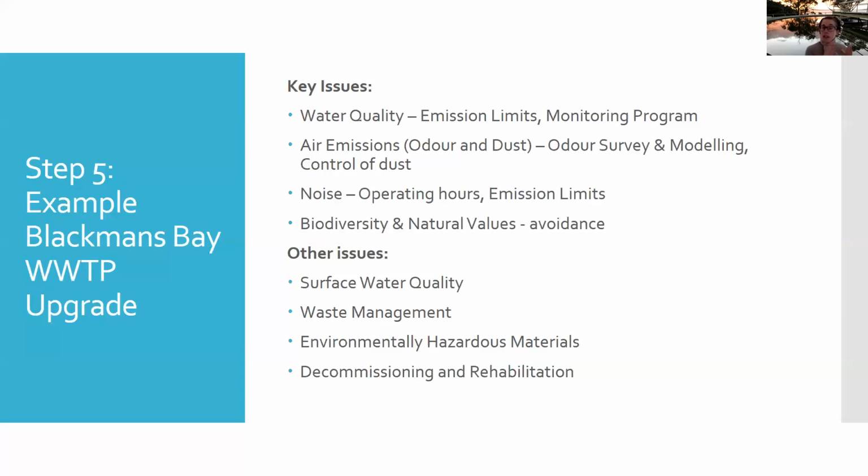But also, if you read the Act, I'm not sure anyone has, but there is a whole section about contaminated land and contaminated land management. Wastewater treatment plants are classed as contaminated sites, because you can see that there is a likelihood that there'll be contamination at a wastewater treatment plant. So if they start to do works that trigger the contaminated site section of the Act, they might have to go and get further statutory approvals to do that work.